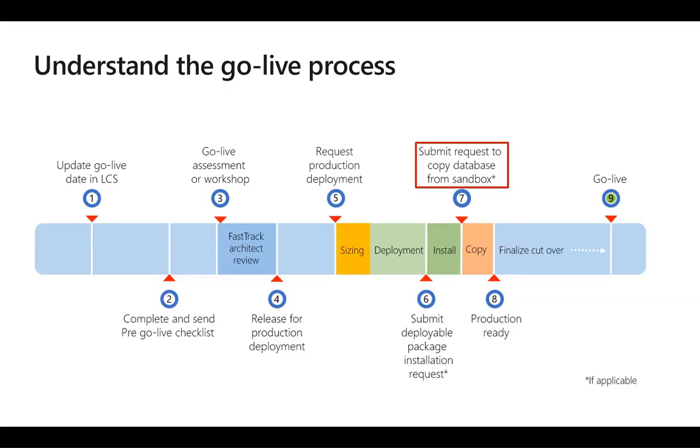Once requested, Dynamics Service Engineering (DSE) will copy the production database and make it available in the LCS project's asset library. Note that it might need 5 hours lead time and result in 2 hours downtime. Generally, the database copy is completed in less than 1 hour, but Microsoft still recommends that we provide a downtime window of 2 hours in case rollback is required for any reason.